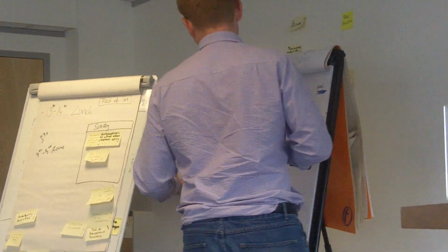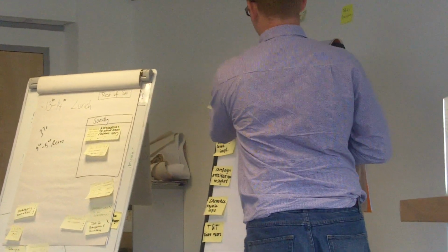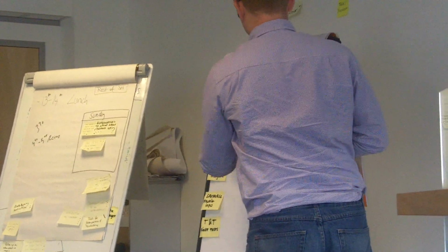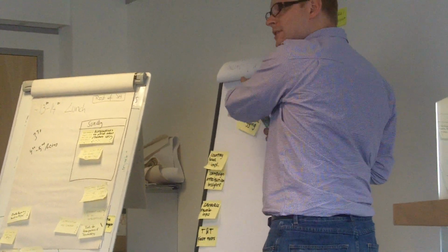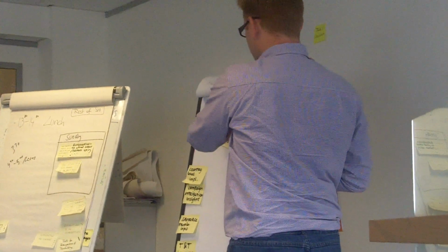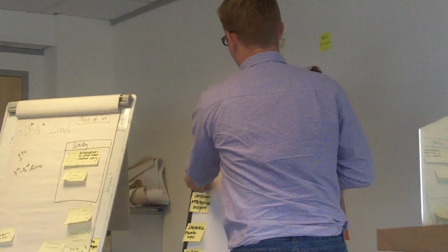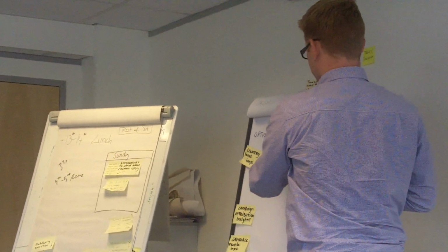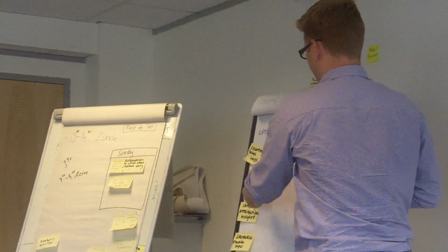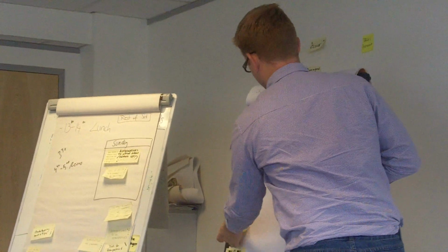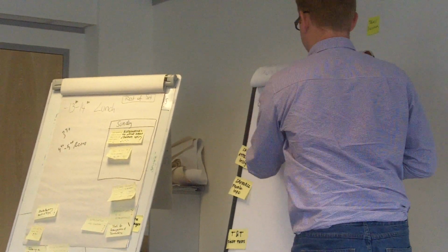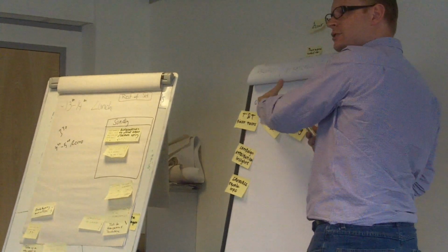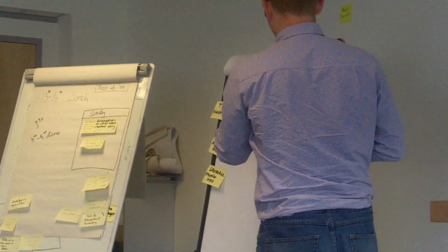So what happens is, a typical week might go like this. The designer takes one of these, he does all of the wireframes. In the meantime, while he's doing that, the coders are either helping him to keep the process going, or they are trying something else that's new, or they're spiking something. Hopefully that won't take too long, and then once this has been finished, the coder pulls that across to there and starts working on it. When the designer's finished, he takes the next one, starts working on it. The stakeholder comes and says that's now really important. Nobody cares because they're not being interrupted, because they're doing what they're working on.